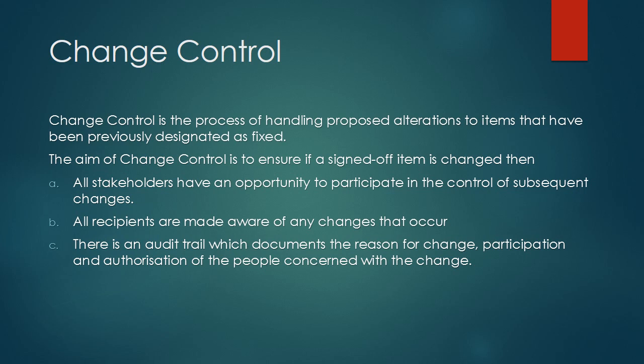Okay, let's look into what types of change controls there are. There are 4 types of change controls: scope change control, cost change control, schedule change control and contract change control. Let's say that a change has arisen, we will have to see if this change can impact the project scope. Next, coming to cost change control, it is also possible that the change which is changing the scope might affect the cost. So they are integrated with each other, or there may be an independent change to the cost.